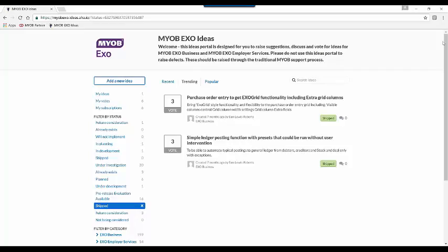So anybody that works in a project type of work, quite often what they invoice out to the client is quite different to what time and materials actually get spent on the job. Because you'll generally have an agreement with the client for progress billing, and it will allow you to track the stages of the job, and report at the end of the job on what it's actually cost you to complete the job.